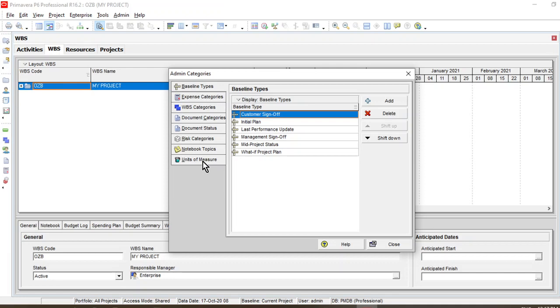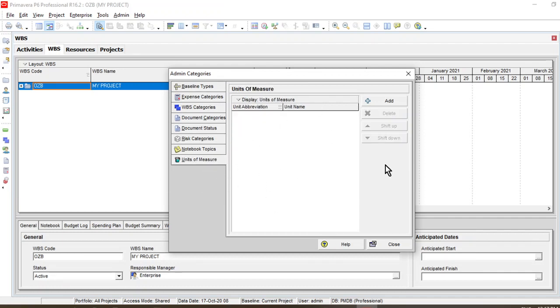You can change the units of measure if they have not already been added in the software. For example, if I am going to buy cement, the unit of cement is bags. But as far as the activities are concerned, I am going to make the calculation not in bags but in some volume. I need to make a particular unit for this software, particularly for the cement or even for steel. So that's how I can use this command to make it easier to adjust the activity units or the resource unit based upon my own convenience.